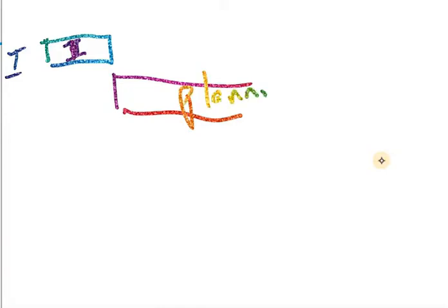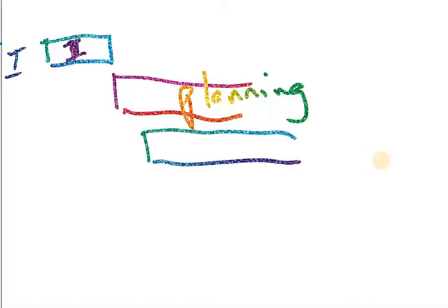Once the project is initiated, we start with the planning activities. So here's planning. This is where we do all sorts of planning. We gather requirements, we develop the scope, the WBS, and so on. When we have enough planned, we can start with execution. So we don't really have to wait for all of the planning to complete. We can start executing. Execution starts here. This is where we know some things and we can start to execute them.